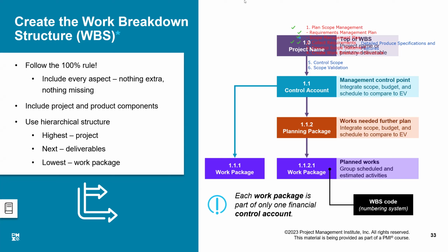Yes, we have got quantity surveyors. Once a job is done, for example, a wall has been constructed, the quantity surveyor ensures how much material has actually been allocated and spent on that. Based on the spending of all the materials, he will prepare a report that 30% of the material has been spent. So they give a progress of 30%. It makes sense, isn't it?